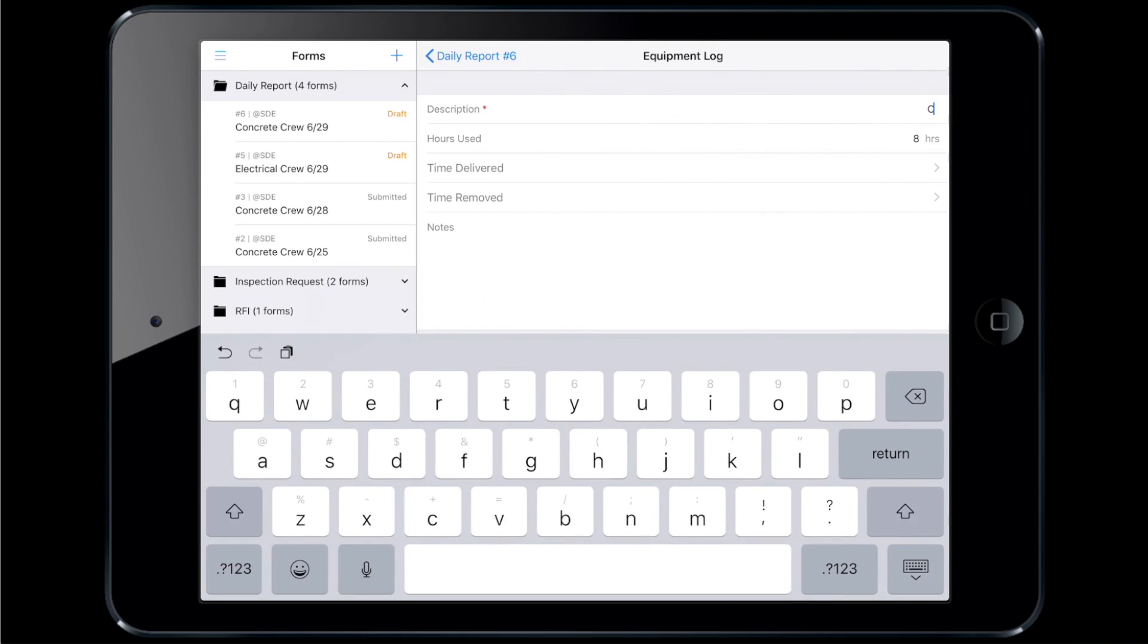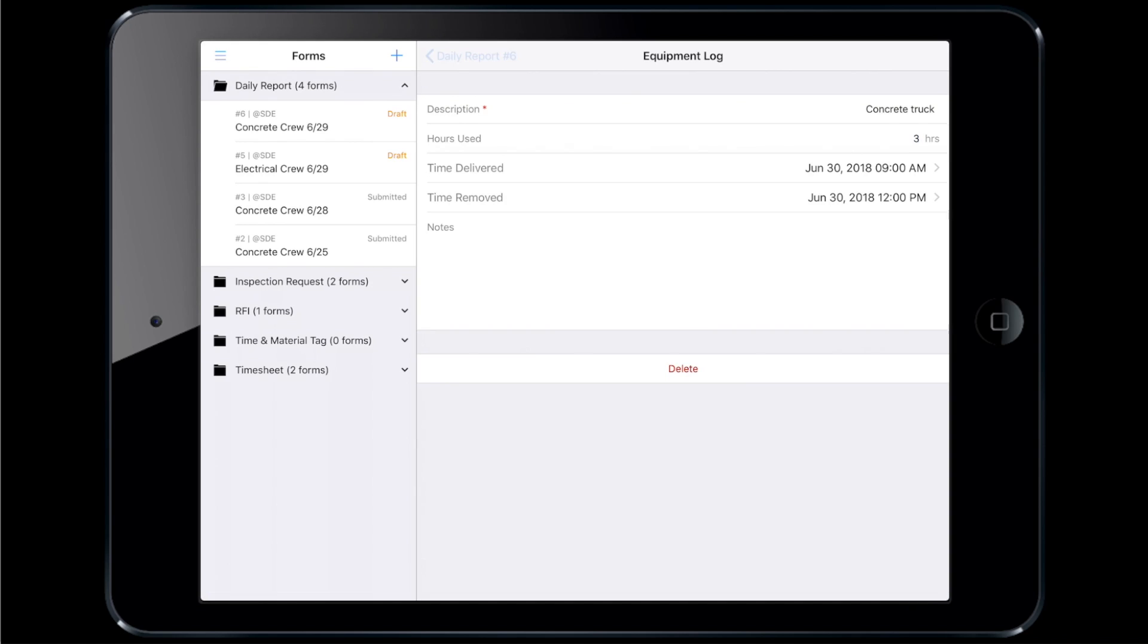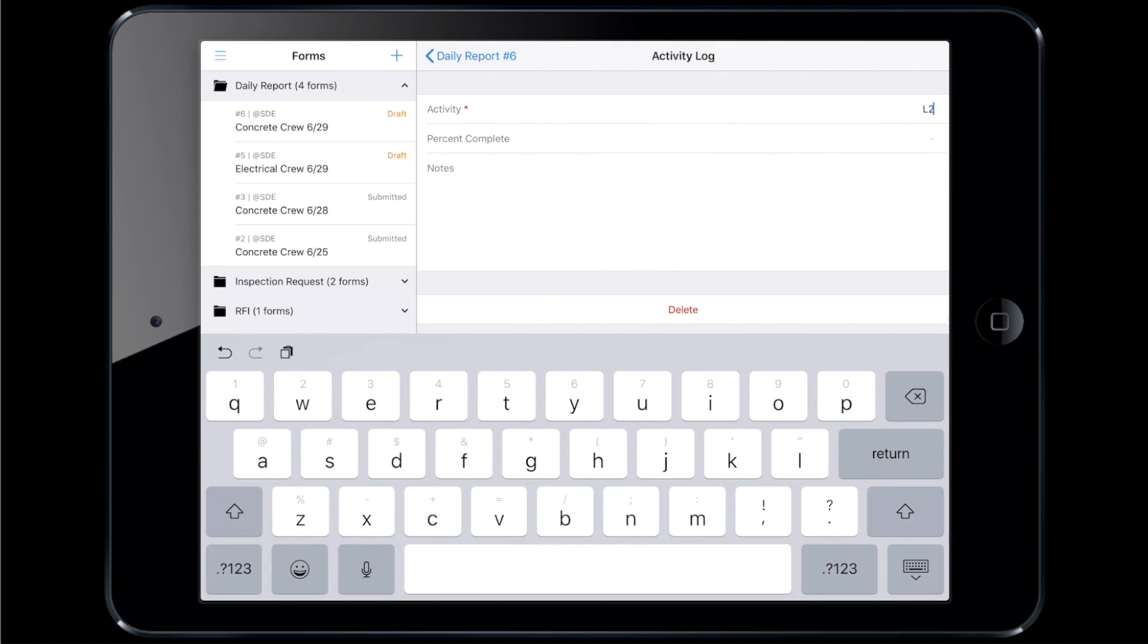Steven now records his team's use of the concrete truck and the materials delivered. Finally, he records the progress of the activities worked on that day.